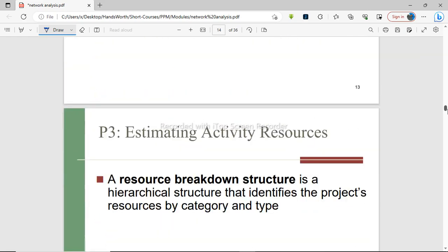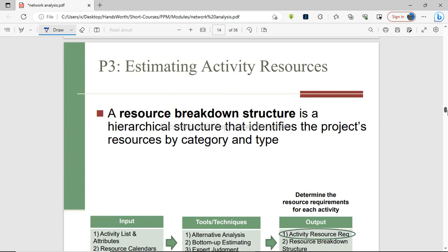So now we go to the third phase of the time management process under project implementation. After you have defined the activities that will be involved in implementing your project under the first phase, and then you have also sequenced them, you have formulated a sequence or a diagram to show how they are flowing and interconnected to each other, the first step under the third phase is to estimate the resources required for each given activity.